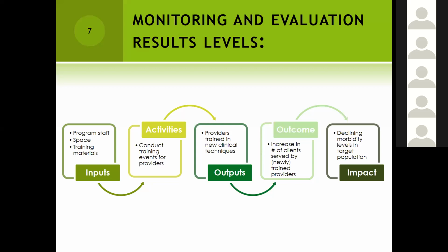and how activities lead to outputs, and how outputs lead to outcomes, and how outcomes also lead to the impact, because the impact becomes the long-term results that we expect out of a particular intervention that we are doing in some of the projects that we implement in our organization. So when you look at the inputs, some of the critical inputs would be things like staff, space, training materials.